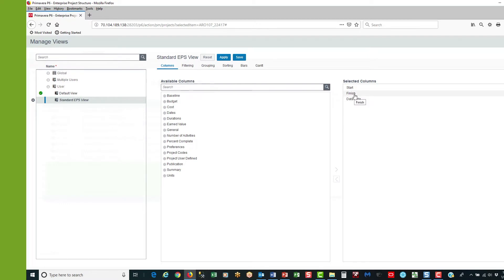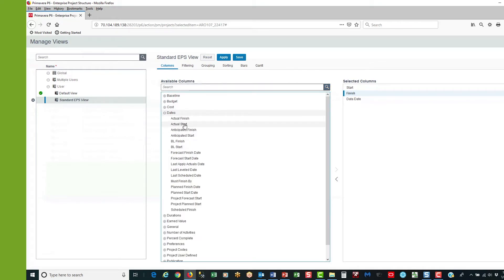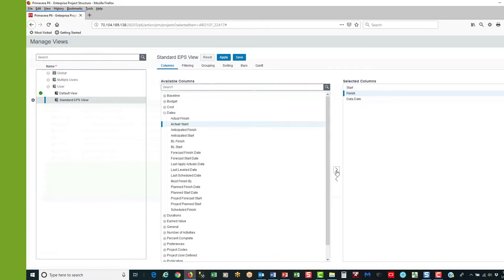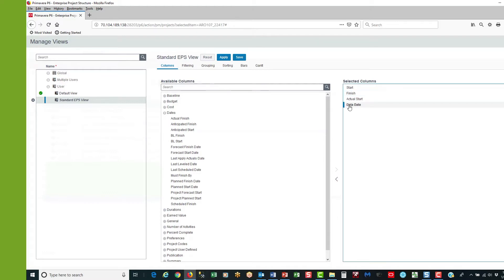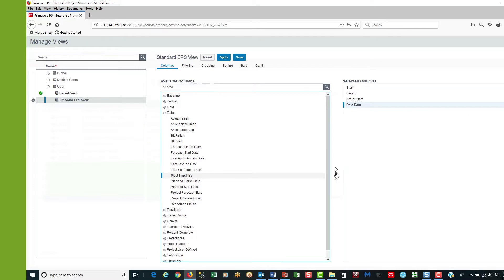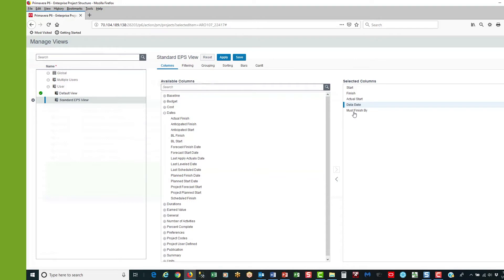Now I want to add actual start, which is in the dates category. So I select dates and then actual start, and then I select the centre arrow to move it to the right — that adds actual start. I've already got data date, and now I want must finish by. Again the centre arrow moves it to the right and then I have must finish by.